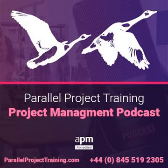So you get a central PMO, which is what I described, where you've got one PMO serving multiple projects. So they're not embedded in the project anymore, they're embedded in the business. Then you get what they call a hub and spoke arrangement. This is new to me. Hub and spoke is where you don't have one centralised function, you don't have a centralised PMO. You have a disaggregated, almost virtual, arrangement. So you might have a risk department, an estimating department, a planning department, estimators and what have you, all spread around the business. Controls department. And then the individual projects dip into and out of them. It's a matrix structure for a project office.